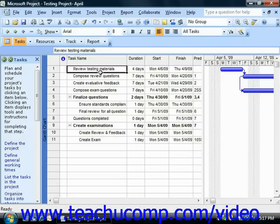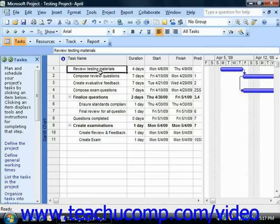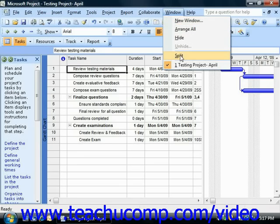To allocate resources to tasks, you need to be able to select the task items. You should switch to the Gantt chart view of your project file when assigning resources. You can also see the changes to task durations in this view as well. A helpful feature of the Gantt chart view is that you can view resource assignments for selected tasks in a separate task form within the Gantt chart view. To enable the display of the task form within the Gantt chart view, select Window from the menu bar and then choose the Split command.